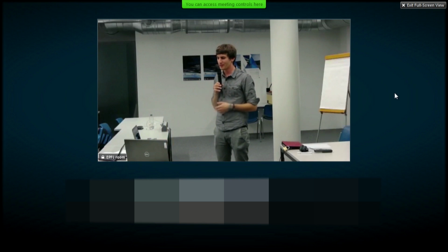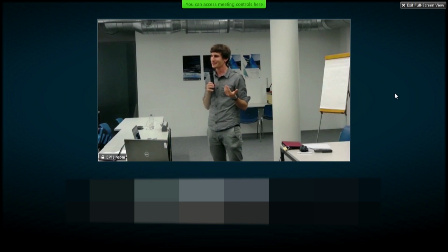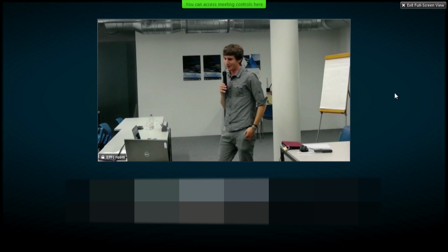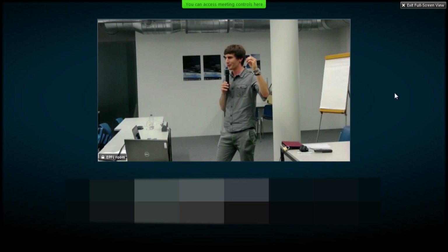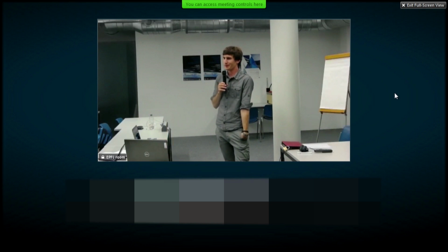There's also, of course, we didn't have formal PDR or CDR because we're a small team, and also because we're not doing this, let's say, as a main occupation. Well, yes, it is kind of a main occupation, but we're still studying next to it. Also, we may change our design decisions on the way, not the complete design, but minor things of it. And we mainly focus on this approach to do rapid prototyping and do a lot of iterations on one thing, instead of making first concept studies and then selecting the best one and only then really going to build it and cut metal, as Oli said. That we can do because we basically have all these low cost components. So it doesn't cost us a lot to build one prototype because everything is 3D printed, everything is electronics that is pretty cheaply doable right now.